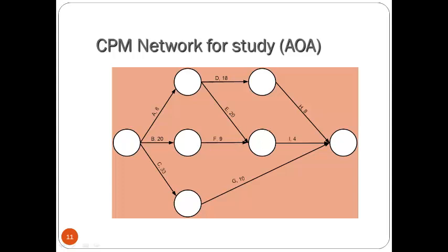And by using this CPM or PERT method, or this network, what we can do is try to find out how long a certain project takes, and which is the critical path. Critical path means the activities on that path cannot be delayed, otherwise the entire project will be delayed. And also later we'll talk about when we control the project, say when the project progresses for a period, and we find, okay, we're late, and we want to find out whether